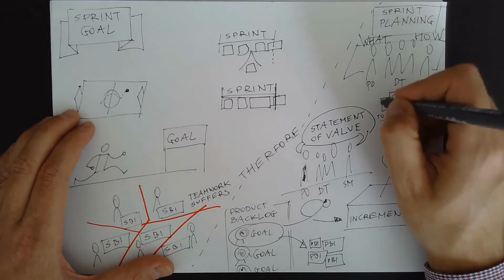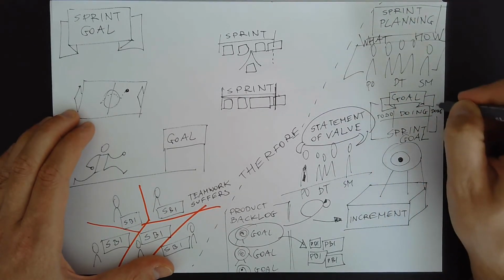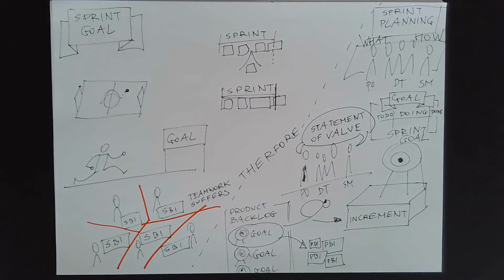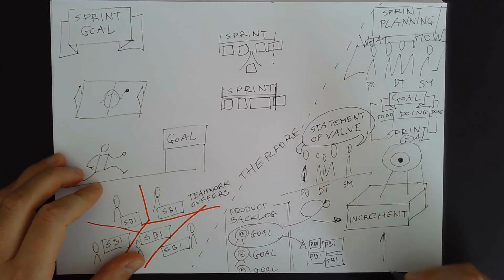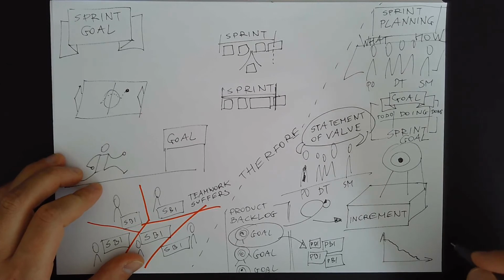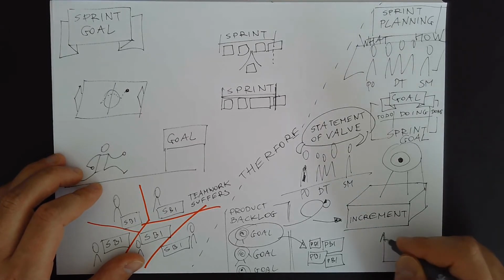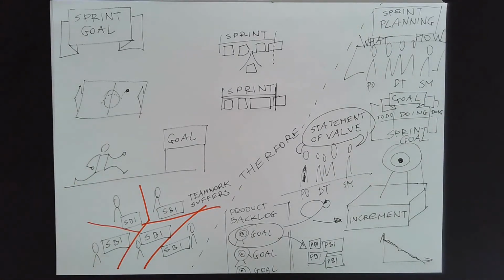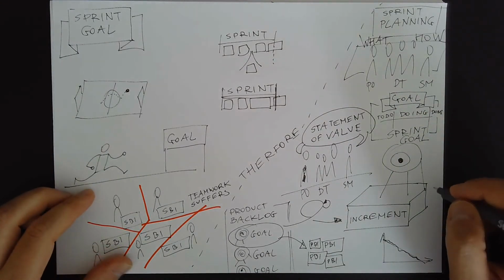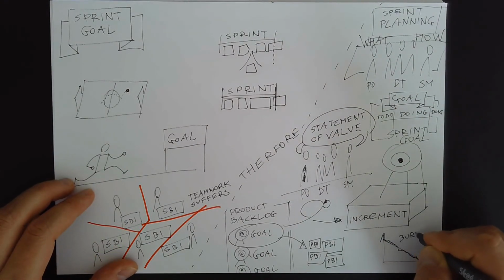Progress on the sprint backlog, such as indicated on the sprint burndown chart, is like progress down the soccer field during the sprint. Though each yard of progress brings the ball closer to the end, the value comes in the goal. But it is sometimes possible to complete the sprint goal in some way without completing all sprint backlog items.